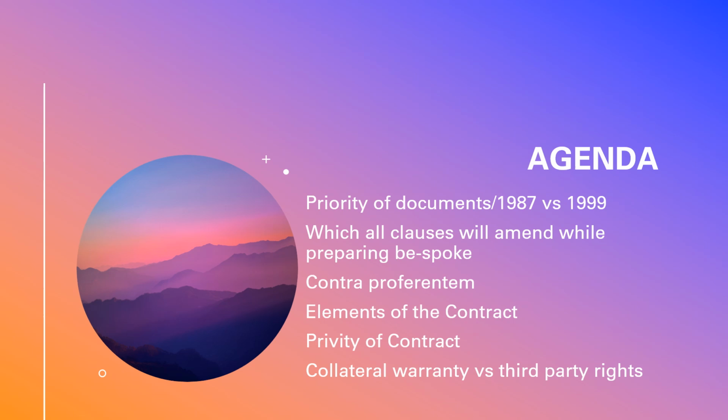But if you want to change that, because now you cannot, as an employer or engineer, give any instruction, so if you want to add some provision in the contract, you have to define in the contract first your name. Okay, in the definition section you mention Employer. Employer is this company. When you write Employer, make it capital E. Employer is this entity.